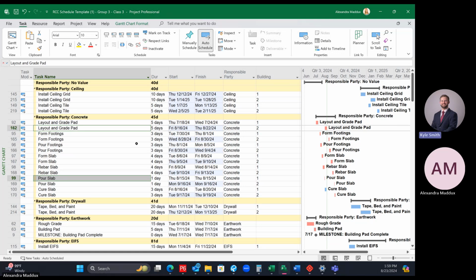So click the first one, then using your control key down, click the second one and then click the link tool. Then you should see that everything's staggered. Everything that has a light blue shade here is everything that had a date change from that one change that we just made.